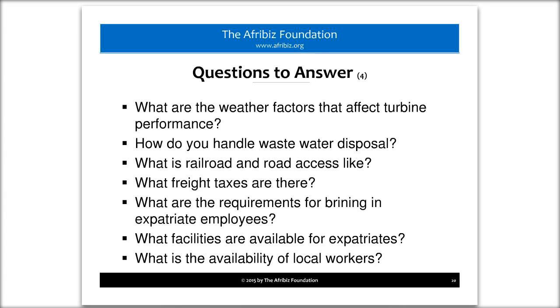Oftentimes what companies will do is they will get the EPC, they'll bring in the manager, the EPC. The EPC will try to find local contractors and people to do work on the projects. And then the same thing, trying to find a local operator. And so these things, however, can also make or break the opportunity. What facilities are available for your expatriates?